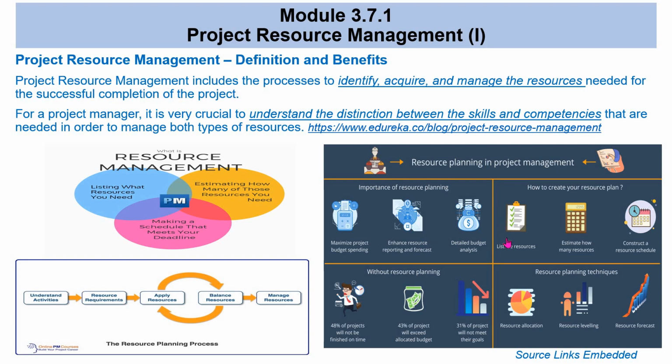And of course, like we said, you create the resource plan by knowing the list of resources, which activities they need to go to, how many of the resources, and how it maps to the schedule. And if you don't do resource planning, then basically you run into the project not finishing on time, you exceed the budget, and you might not meet your end goal.